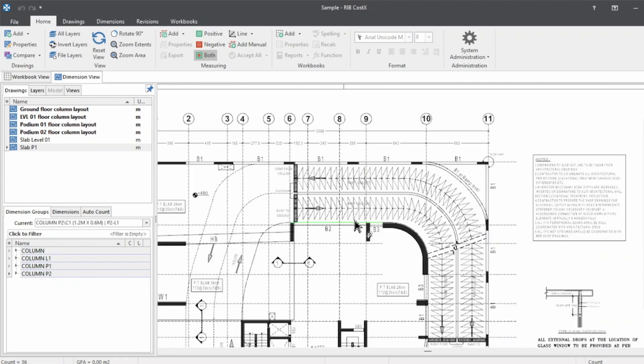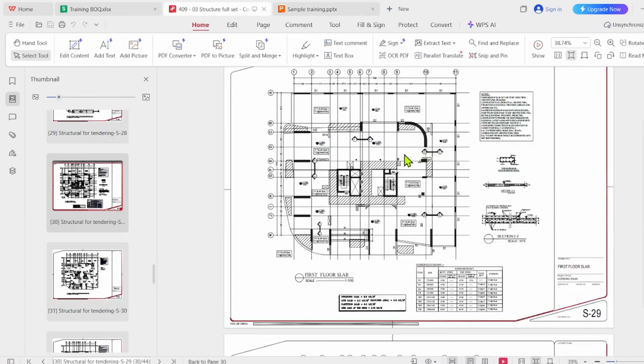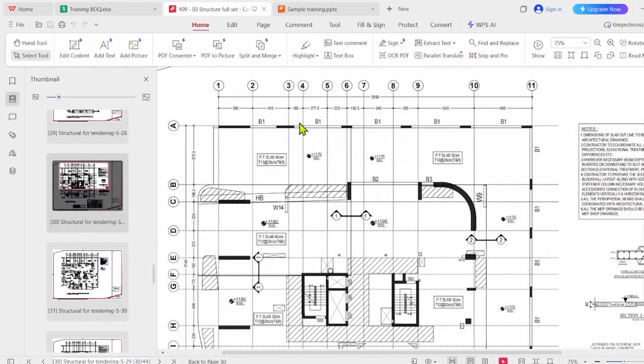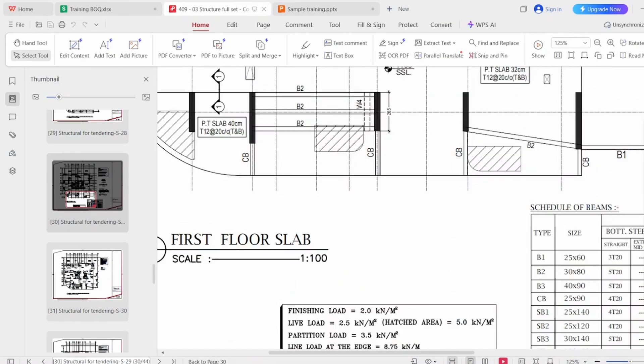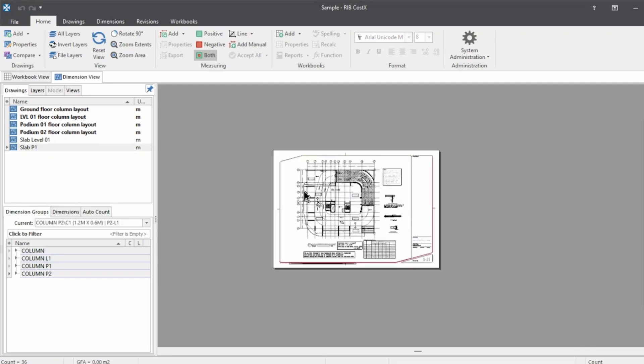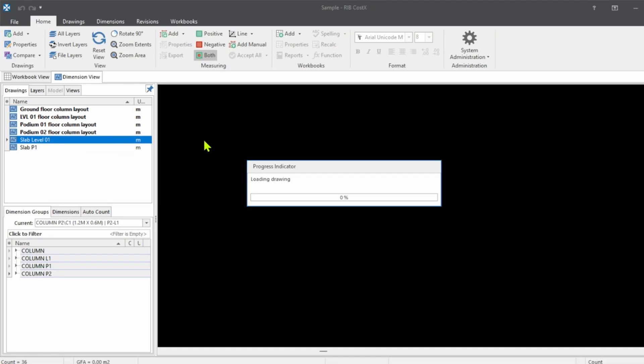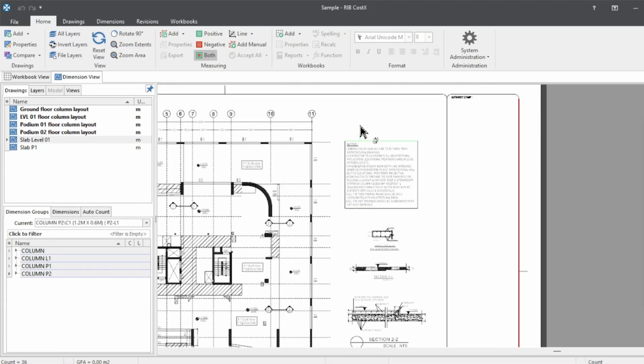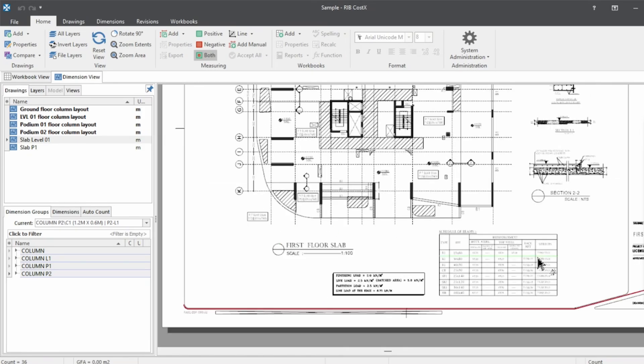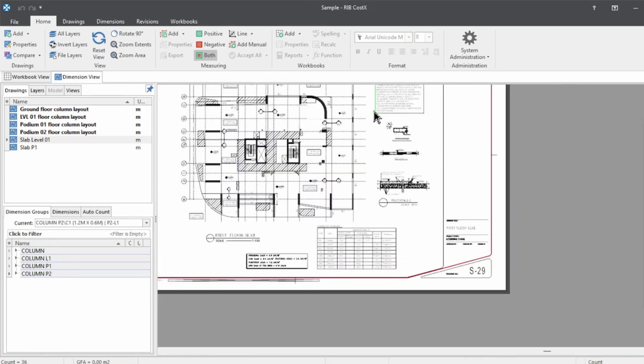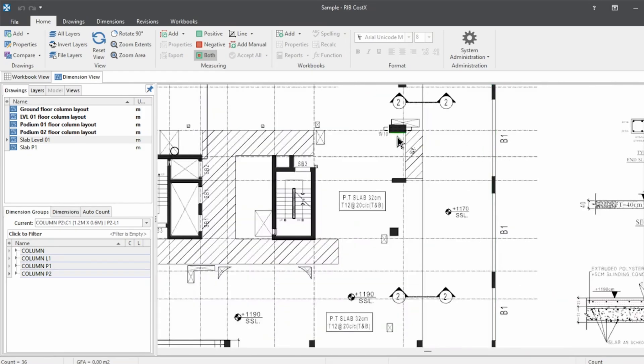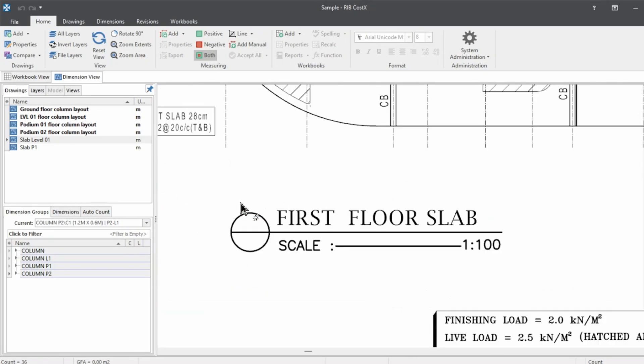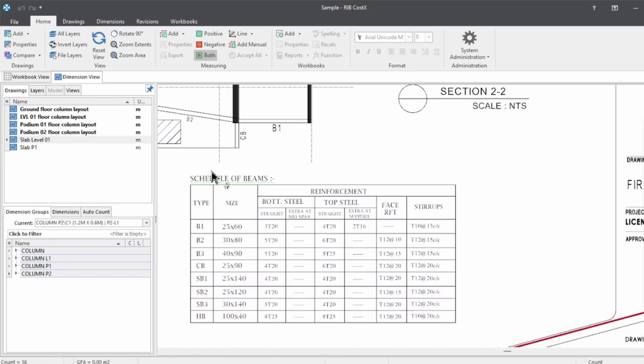Let's start calculating the beam. Here I have a structural drawing set. As we all know, the beams have to be marked in the floor plan. For the training session, I already imported two slabs—level one and podium—in the CostX. Before we start marking up, let's know what details we need. We need the floor drawings and the schedule of the beams. If there is any special beams or obscured beams, we need the sections as well.